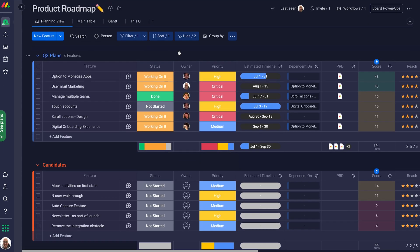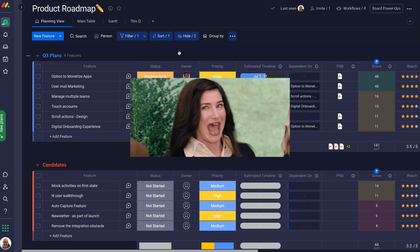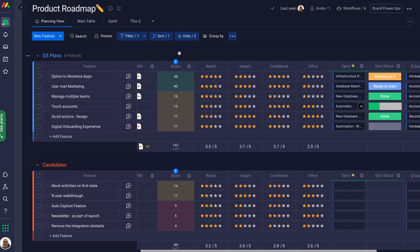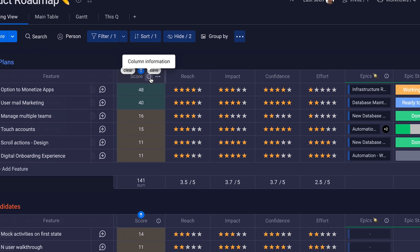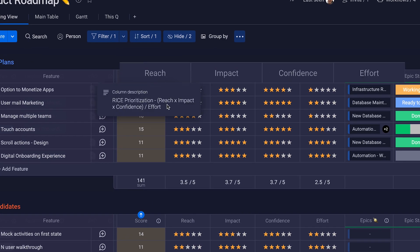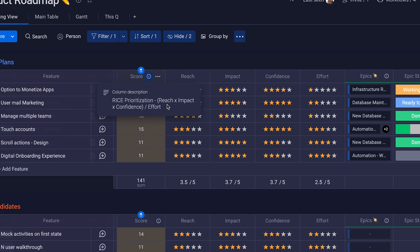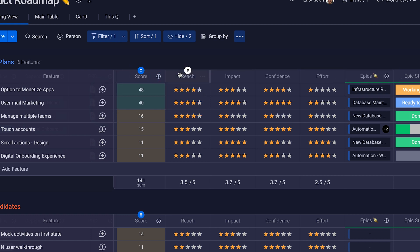On the roadmap, product managers can lay out the plan for upcoming quarters or years. There's no rush, right? Prioritizing is the name of the game here. Use the RICE method to vote on each feature. You can change this if you want. With RICE, the higher the score, prioritize it more. Easy.